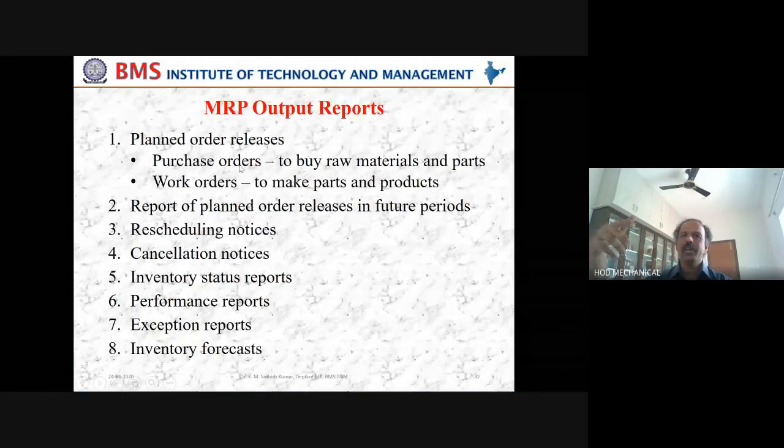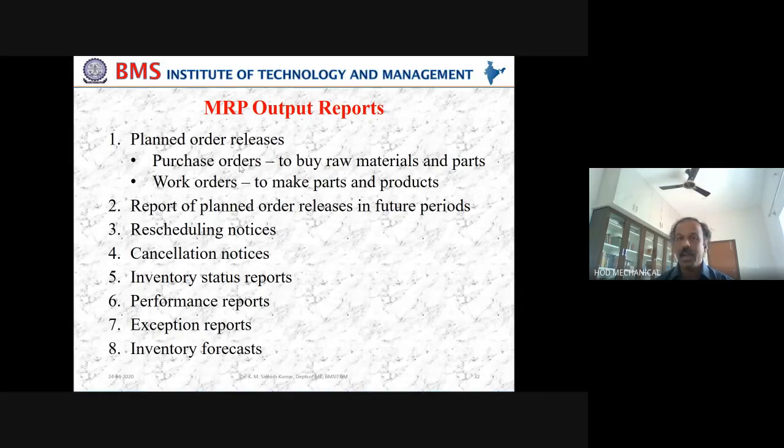Now suddenly there is a surge in the market, a demand wherein you want more material. At that moment, what are you going to do? You have already placed the purchase order. As a continuation of that purchase order, you will issue one more thing called a rescheduling notice.